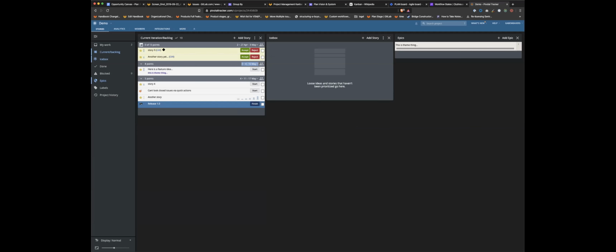So this is my current one right here, which is the 27th through May 3rd, or maybe that's the one coming up next week. I'm not sure. No, that's this week. Yeah. So this is what this week is. This is next week's. This is the following week, and I only have one thing in next week because my velocity is 10, and this is an 8-point story, so I can't fit anything else below it in. But the entire column represents one iteration.